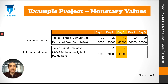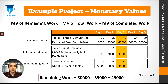Let's look at our example project from the perspective of monetary values. On day 3, we had planned to complete 40 tables — the monetary value was $40,000. But in fact, we completed only 35 tables and the earned value came out to be $35,000. So 45 tables are still to be built, and the monetary value of these tables is $45,000.